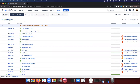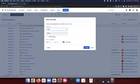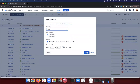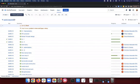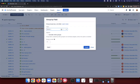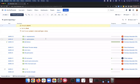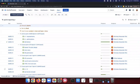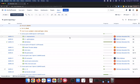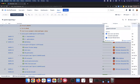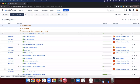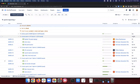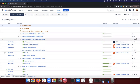From here we can do a lot of different things. Maybe we want to sort the list by rank — when we sort by rank, the structure updates the ranks. I might also want to group them by sprint. Now they're grouped by sprint and I can see each item. Since they're grouped by sprint, I probably want to understand how much work I have in each sprint. Using original estimate, I can see how much work is assigned to each individual item, but I don't have anything at the sprint level. To do that, I'd want to sum over sub-items — now it's rolling up. My active sprint has about two weeks of work, my next sprint has a little less, and the sprint after has about three weeks — maybe I'm a little overloaded.